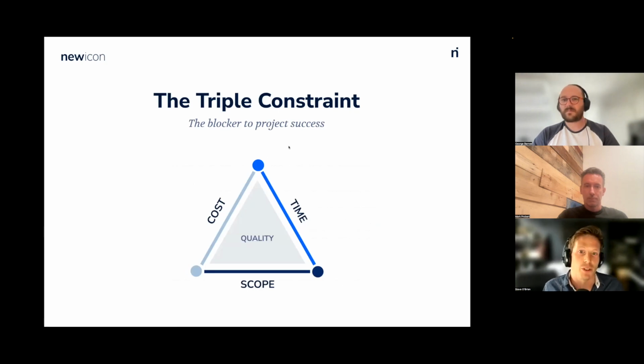This brings us on to the iron triangle, which essentially says that you've got cost, time, and scope. You can fix two, choose two that you want, because if you fix the time and you fix the cost, a new scope becomes available, you've got nowhere to move. And that means the only place you've got left to go is quality. If you're adding more things in the same time, the same budget, everyone has to work much harder, but also you have to sacrifice on the quality of that system.